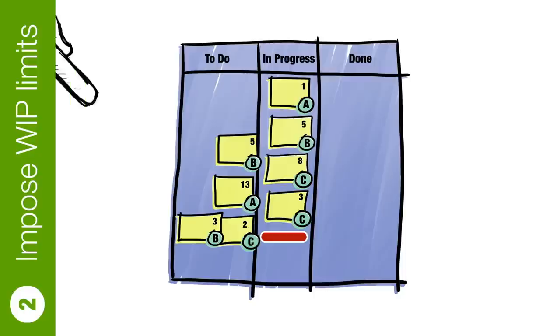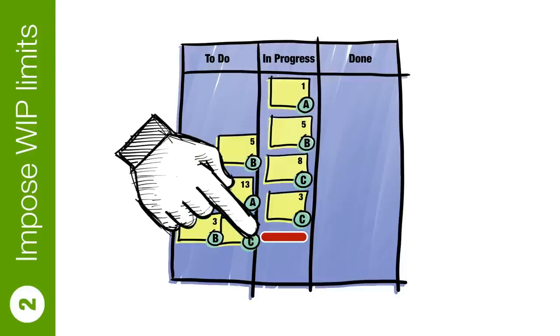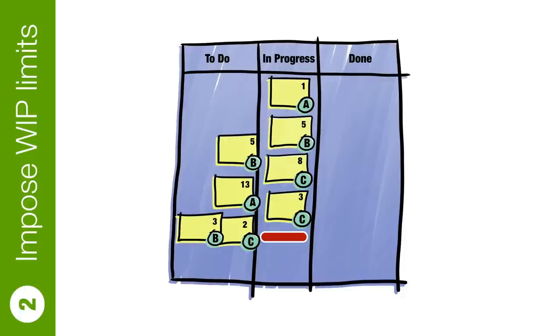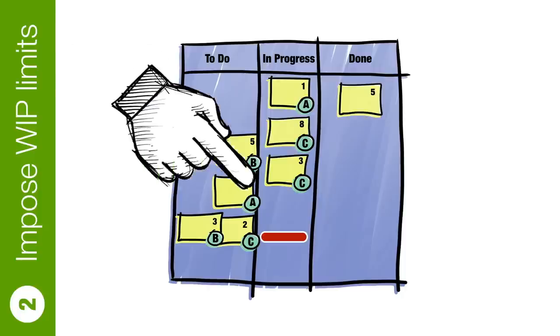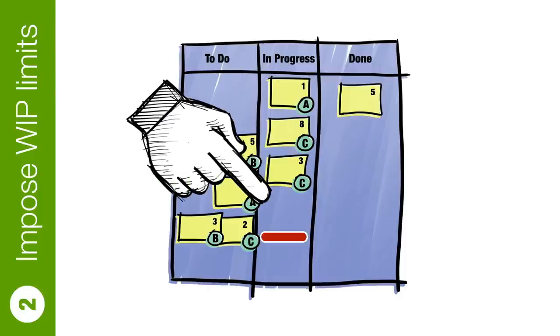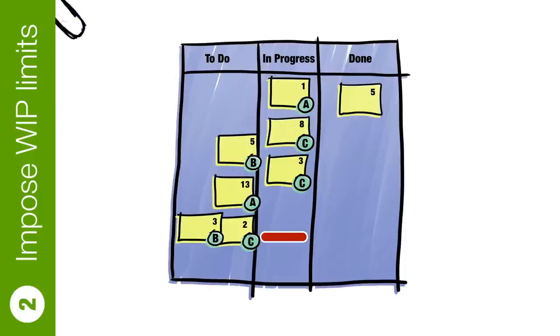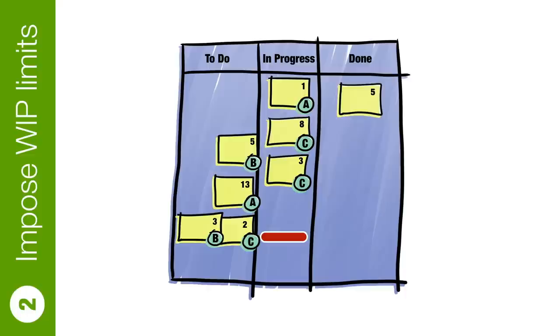Back at the office, the pull system is enabled by a line on the board. When a card moves to the right, it frees up space — and it is this space that is the signal, the Kanban, for the team to pull another card from the left. It's great that we've added a pull to our board, but I think we can take it up a notch.